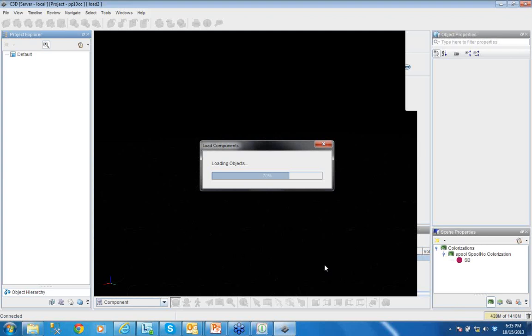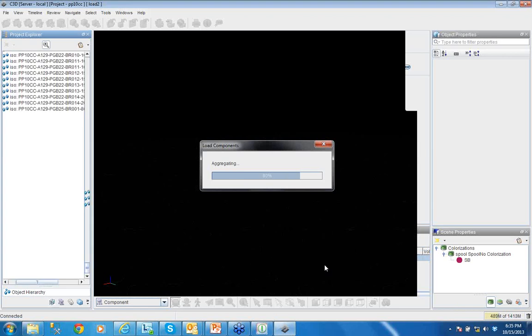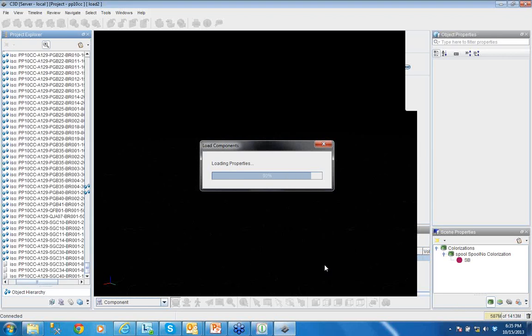This is basically a power plant where we had to do the detailing. The detailing was not done by the fabrication, it was done by a separate office. And we wanted to see if whatever is detailed really has material to be able to erect it or not.